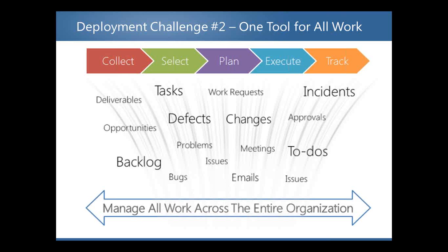So, for example, let's say that Jim and Bill are working on one of your projects and you can't figure out why they're so behind on their task. You go into your PPM system, you see that they're only 50% allocated to 3 projects combined. And of course, for your information, that doesn't give you the insight needed to effectively manage your resources. It also doesn't help Jim and Bill with productivity, because most likely they're going into various systems to manage the various types of work that they're managing.